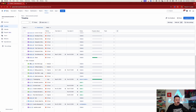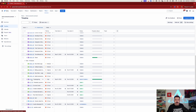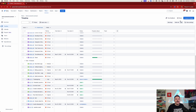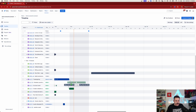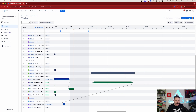You can see issues from multiple projects — for example, mobile ones and MJT ones from another project. The behavior is pretty much the same, and I do have dedicated videos on how to use the JAR. The biggest takeaway is that when you switch to timeline view, you can create dates for tasks across different projects and then link them together with dependencies across teams. That is why we use Advanced Roadmaps — unlike the basic one, you can do cross-team strategic planning and roadmapping.